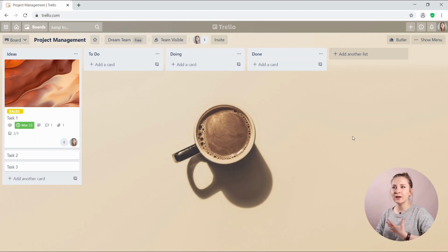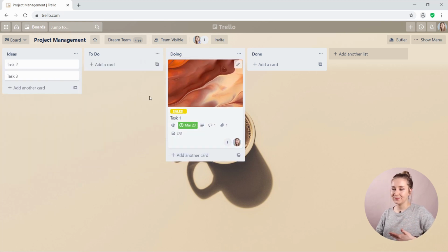So the idea of working within Kanban boards is to update the status of your tasks as you go. When you start at the beginning, or if you're planning different tasks, this is when you would go into Trello and assign different members, assign due dates. So this is the planning stage of it all. And once someone is taking care of the task, the idea is to move them to doing. So this is when you actually are actively working on a task.